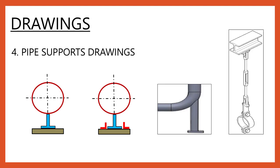The fourth drawing is pipe support drawings. Pipe supports also need to be fabricated and constructed with respect to the piping isometrics. It is very important to have individual pipe support drawings for better fabrication and construction. A few companies have a set of standard pipe support drawings, but in case of non-availability of these standard drawings, we have to prepare pipe support drawings for individual supports.